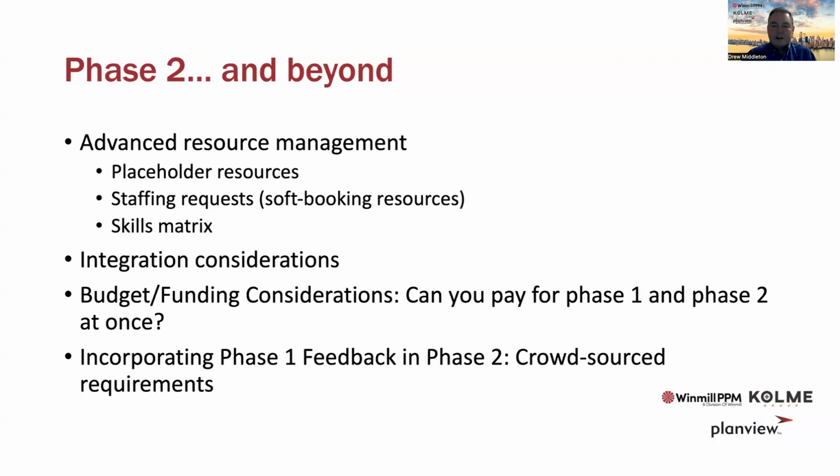Now, when I say an integration, you might not know what I'm talking about in relation to a PPM. So we'll think of a couple of examples here. One integration might be an upstream system that's going to send data down to our PPM. Maybe you've got a CRM, a customer relationship management system, and so you have opportunities in there. And when an opportunity gets to a certain point, we say, yeah, it's likely to be won. Let's put a project in our PPM. So that's a great integration where we can change the intake from a manual intake of project requests to an integrated intake coming from an upstream system.